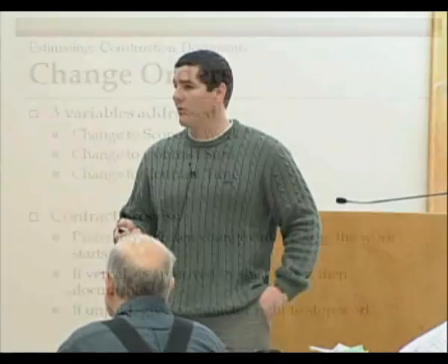There's been cases where the builder hasn't changed the contract time. They've gone over their time frame, and they've been penalized. And they had the right, under the change order, under the terms of their contract, to add days to the project, but they didn't. The contract sum, that's pretty simple, and the scope of work. You want to be as detailed as possible, too, when you get into change orders, okay? So keep track of those change orders.